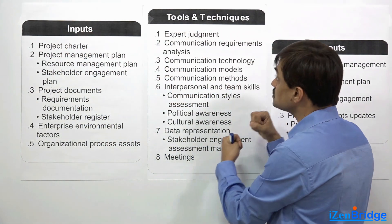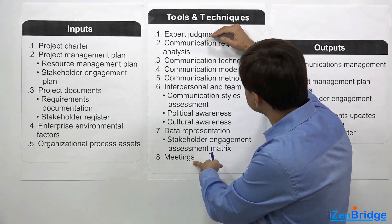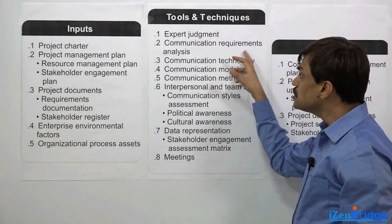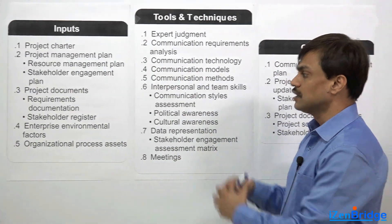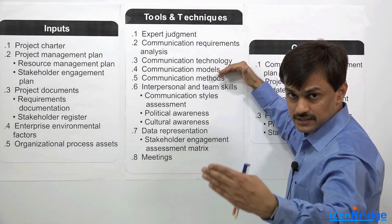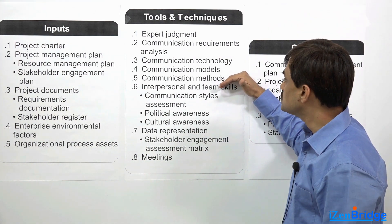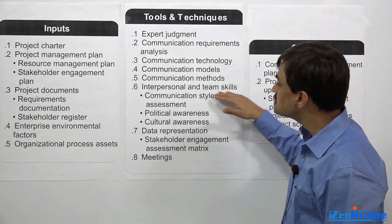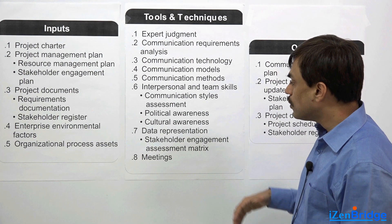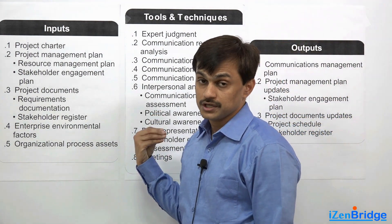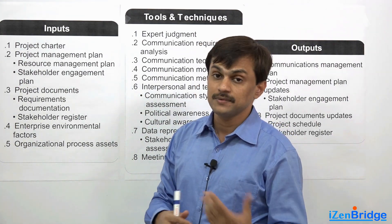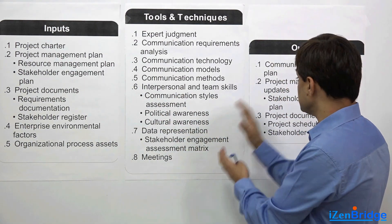You pick up all these inputs and apply tools and techniques. Expert judgment and meetings remain everywhere because somebody has to put their expertise into it. You perform a communication requirements analysis to understand what stakeholders and project teams need. You look at various technology options, communication models — sender, receiver, feedback — and communication methods such as push and pull. You also look at interpersonal and team skills: how are you assessing communication style, and how politically and culturally aware are you when planning communication? There could be a culture where information must be in a particular format, else people feel offended.